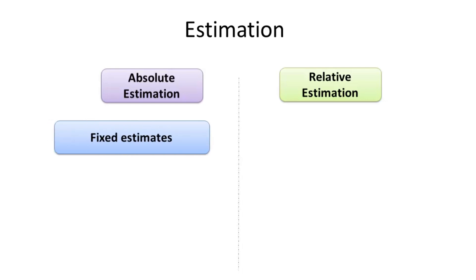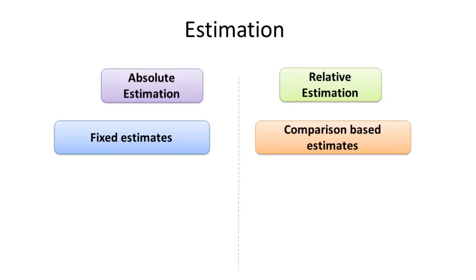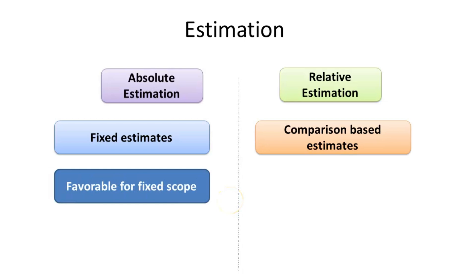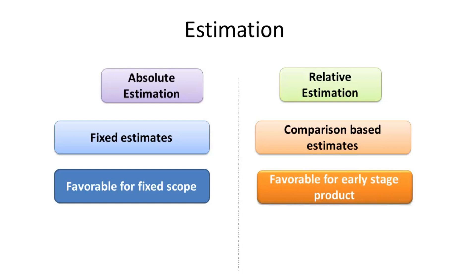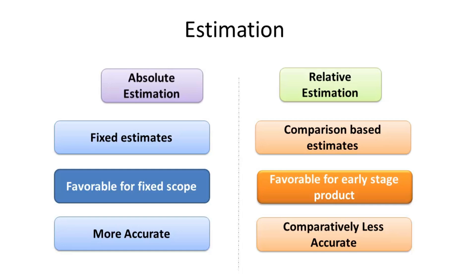Absolute Estimations are fixed estimates and are done in isolation without any comparison, whereas Relative Estimations are comparison-based estimates and are not isolated. Absolute Estimations are favorable in case of fixed project scope and with less uncertainties, whereas Relative Estimation is more favorable for early-stage products where uncertainty is high. In Absolute Estimations the estimates are more accurate, whereas in Relative Estimation the estimates are comparatively less accurate.